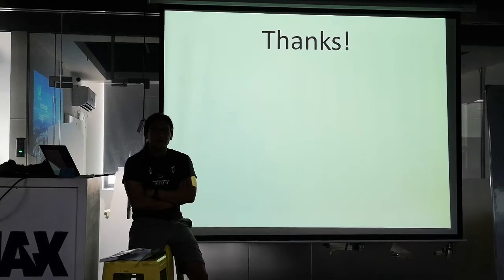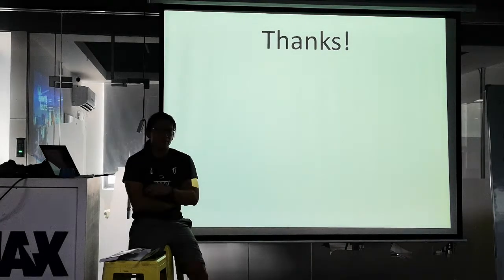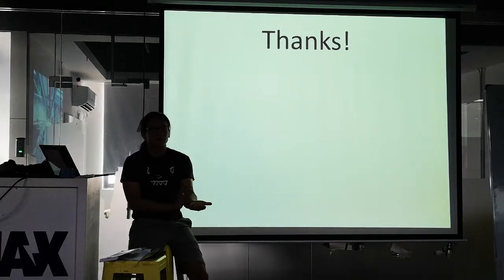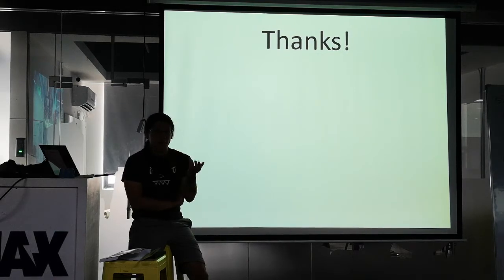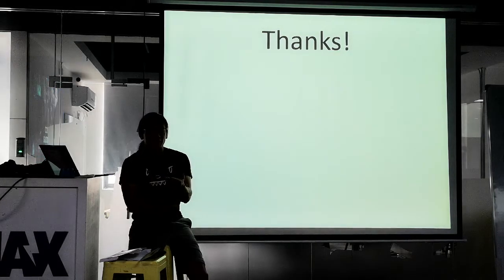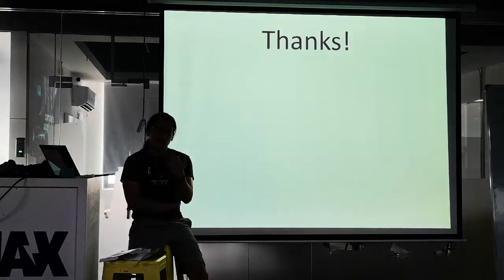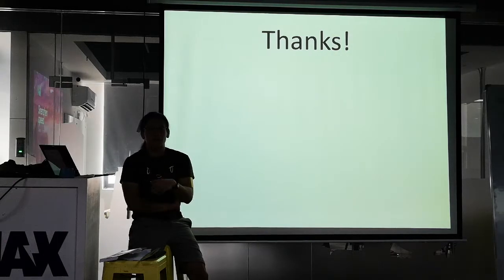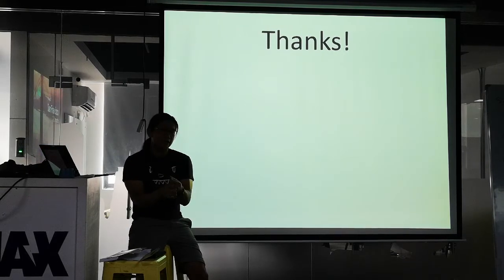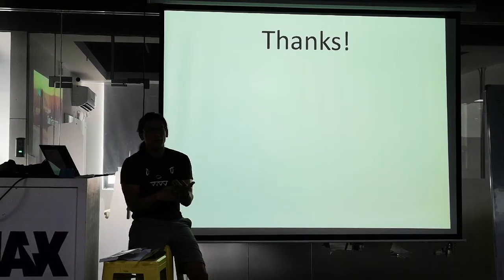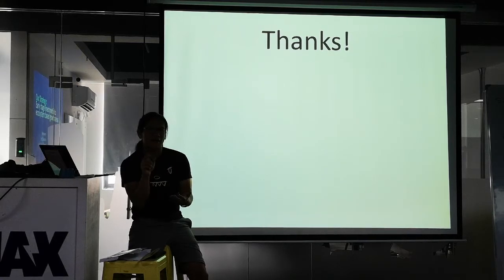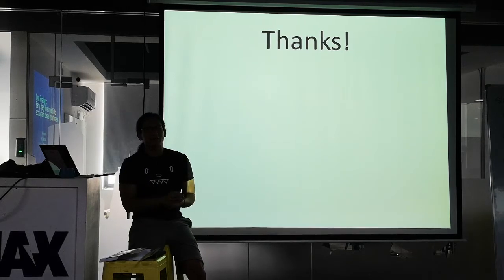Okay. Yeah, and so usually if you place a purchase order and you say, I want you to bring in 100 of these microprocessors, they're very expensive, and you want to change it to a new model number, you definitely want that in writing, right? Because you want to be clear with them, either you're canceling that order, or you're going to refund it, or you're going to sell it to someone else, whatever. So it helps to have that in writing formally, not just a WeChat. Saying, hey, U1 needs to be an STM32F04C, not X, right? That's going to get lost. It's going to be a disaster if you don't get that in writing.